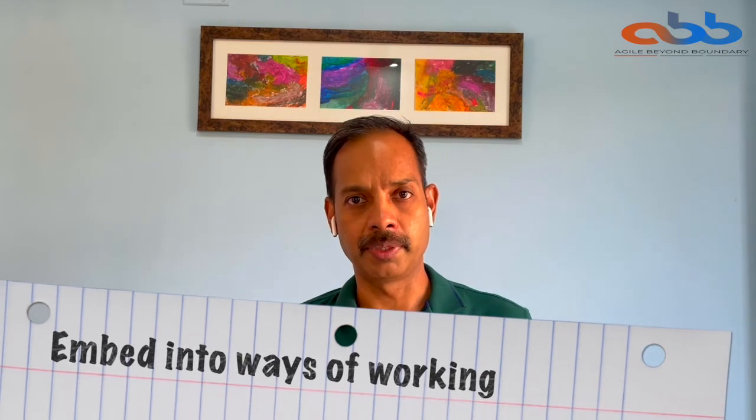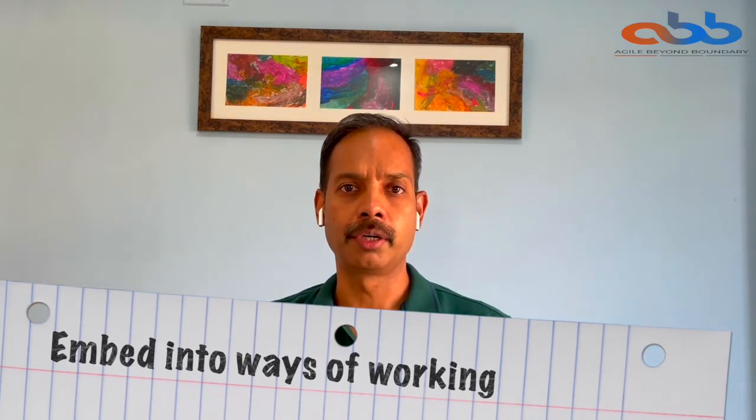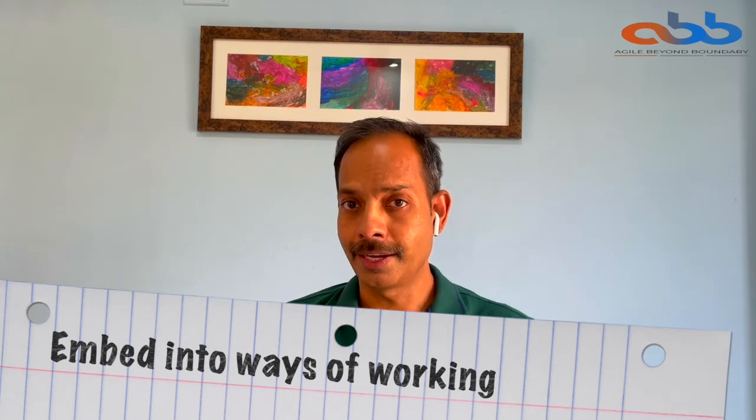Second, you embedded it into your way of working. So you have sprint planning, sprint review, very well aligned with your OKR. And third is you make it much more a live thing. As you do your sprint iterations, one iteration after another starts, likewise, your OKR is not a one-time activity. You define your OKR, your key results change every quarter, your initiatives change every sprint, and you continue to show your confidence level and where you are in the key results using check-ins. So it's a much more live process or live system.